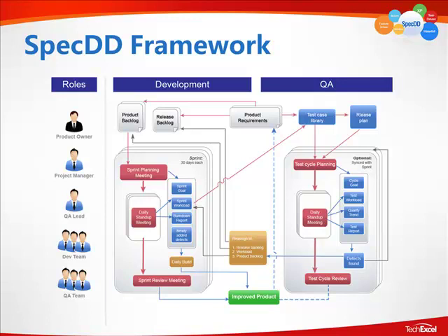A development team in your standard agile methodology simply develops. They create the software based off of what they think is from the requirements, what they think is correct, create it, send it off to QA. Bugs? Defects? Nah, QA will take care of that. This thinking, however, really builds up and hinders a product, the cycle, the team, everything. It wastes a lot of time, because if you develop pretty shoddy software, then you send it off to QA, they test it, they found a bug, it's got to come back.